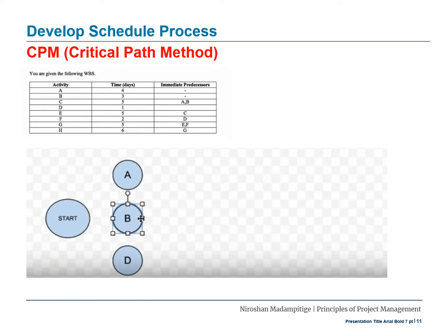These are the activities that will be done at the beginning, which essentially means they do not have any dependencies, so you can start working on them as early as possible as you start the project. So we have 3 different activities that can be started at the beginning. They are A, B, D, because A, B, D do not have any predecessor.